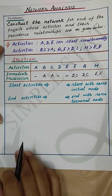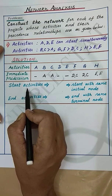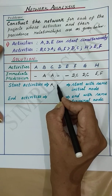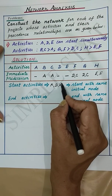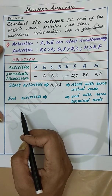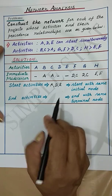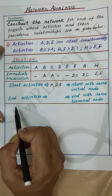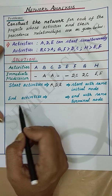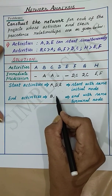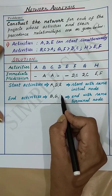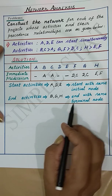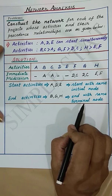The start activities are the activities with no predecessors. Here A, D, and E are the start activities, and they start with the same initial node. The end activities are those with no successors — they are B, G, and H. These activities will end with the same terminal node.